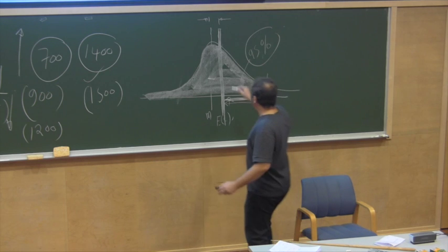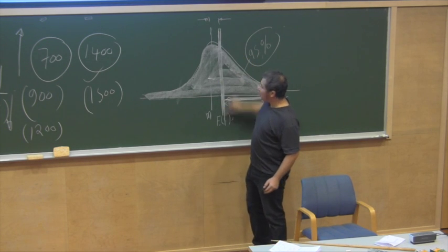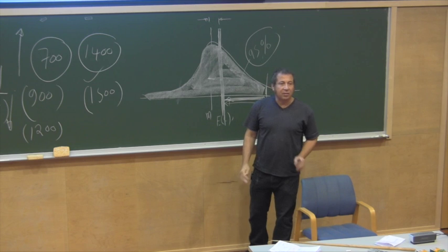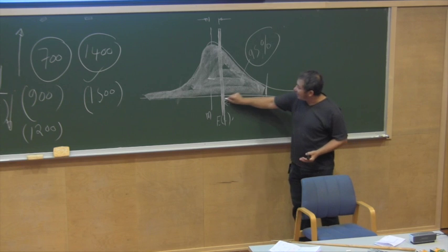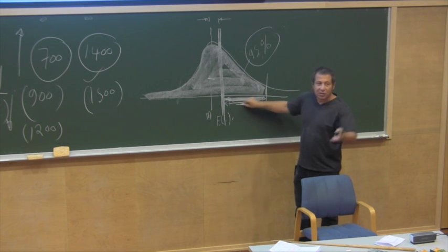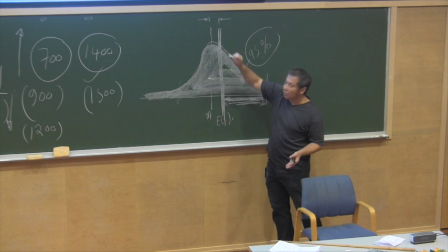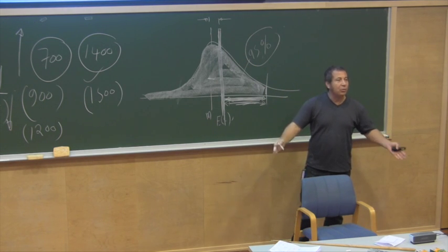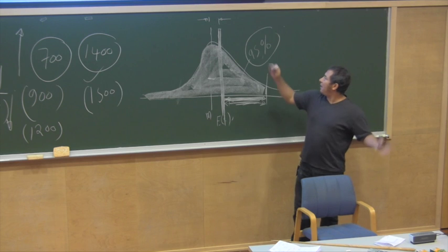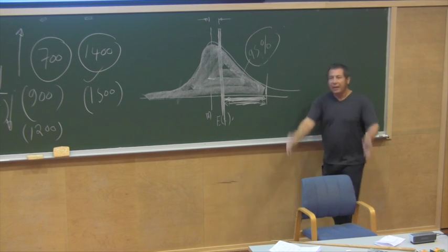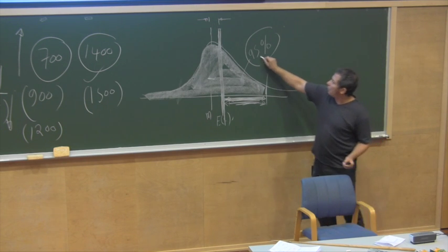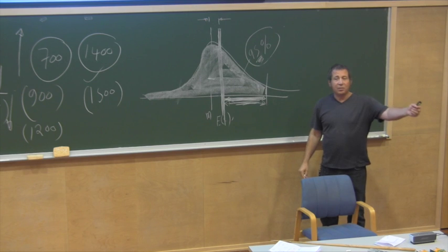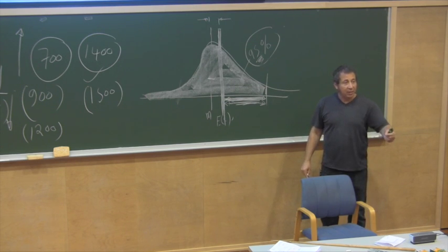Just remember that the difference between the most likely estimate and the expected value is what we refer to as task contingency. And if you want to add more in order to be even more certain, you should find out how many standard deviations you need to add to your cost estimate in order to make sure that your project will be 95% certain, or 85 or 70 or whatever. By the way, if you want to come up with 95% certain, you will go to this normal distribution table, and look where we get the 95%.